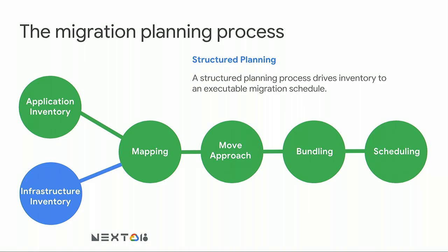Bundles or move groups. In our methodology, the bundle is really the atomic unit, the smallest unit of applications and servers that can move at the same time. So as you're talking about doing a move, that bundle, that group of servers and applications, all has to move together. And if there's a problem, it'll all move back together.